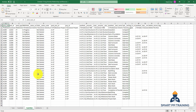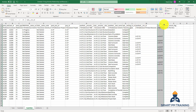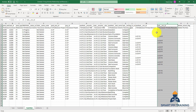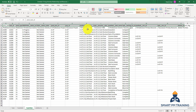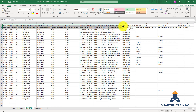The resource assigned data shows because you selected it during export — you can also choose whether to include it or not. You have successor activity and predecessor activity — all relationships are here. This is the Primavera code. You have to keep it in Excel if you want the option to import information from Excel back to Primavera. To do that, make sure the column you are trying to import matches the ID in the first row.